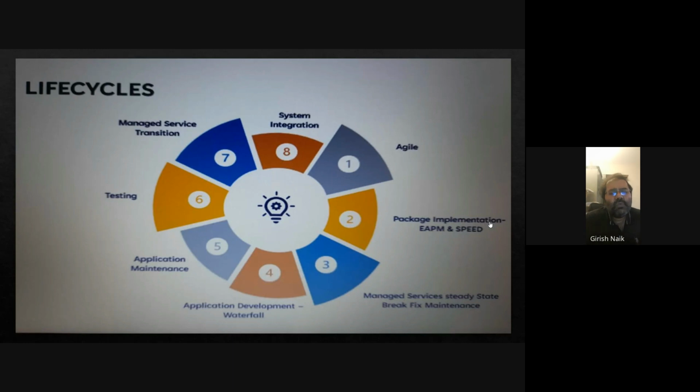Then when you complete the design, you can start writing your unit test plan parallelly, right? Like that, some of the testing activities, mainly the test plan activity, happen parallelly with the initial phases like requirement, design and all that. So everything is not sequential and you save time, right? These are the typical life cycles you see in development engagements.